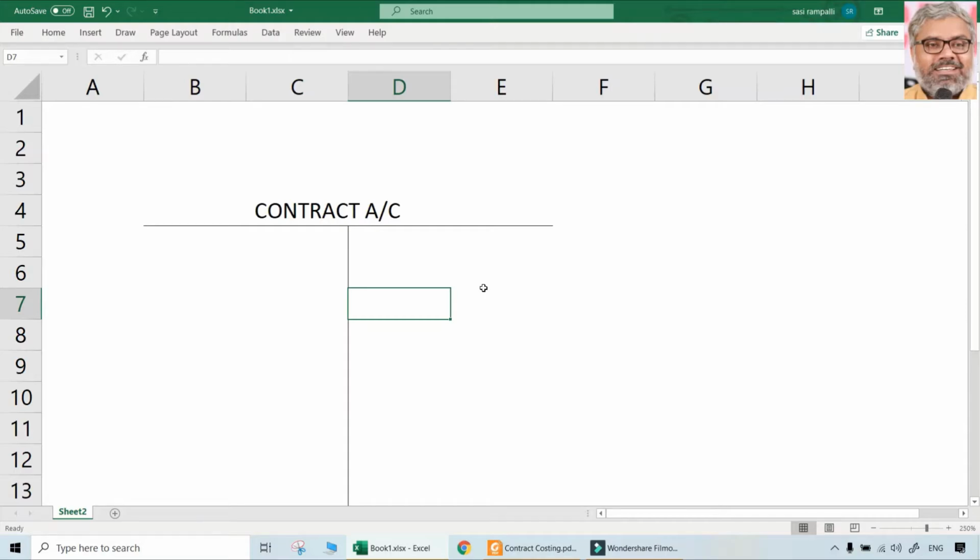So let us say a contractor is working on constructing, let us say, a metro train project like L&T. Or a highway or a big building is being constructed. It will take multiple years to complete that contract. That is the first point. At the end of the period, we need to close the financials and we need to know what actually has happened in financial terms about this contract. That is why we are preparing this contract account. We cannot say, okay, wait, let the contract complete, then I will come to know what it is. That will not be correct.